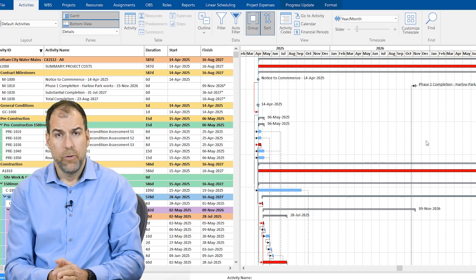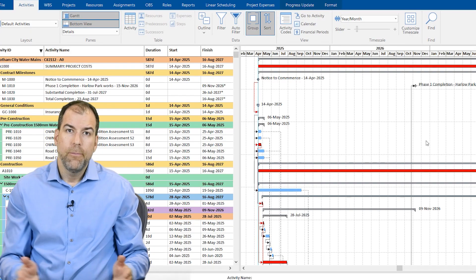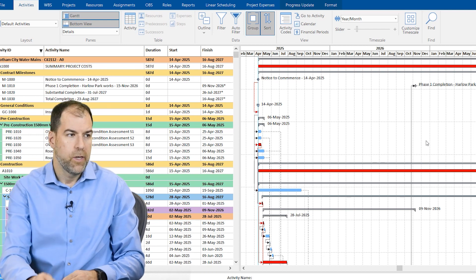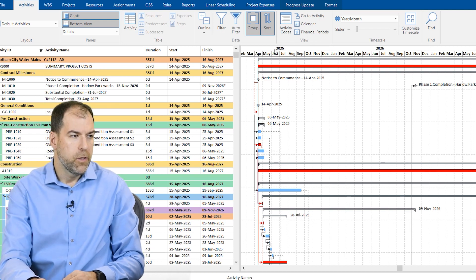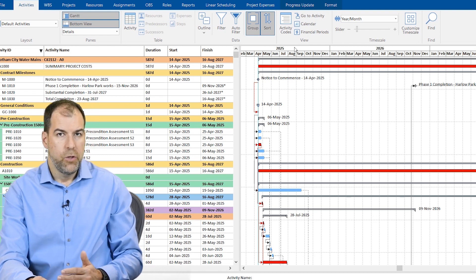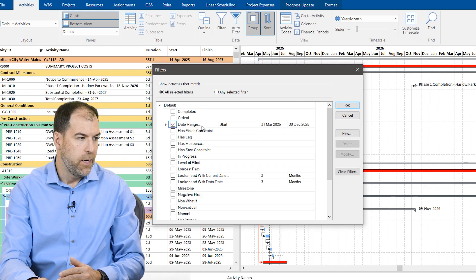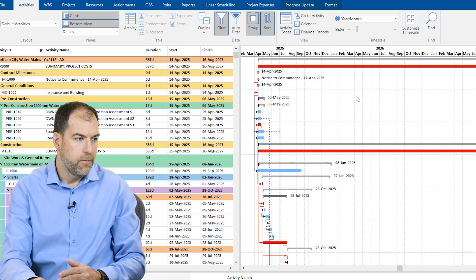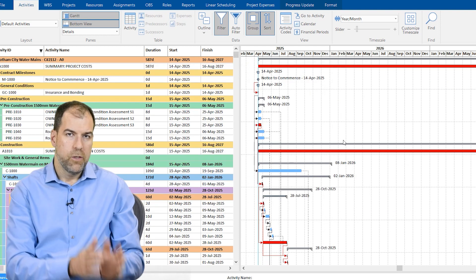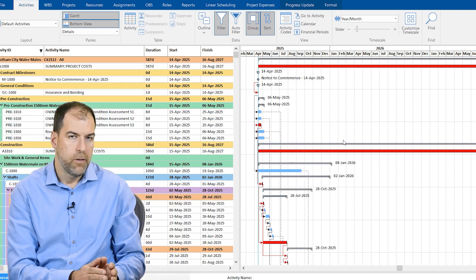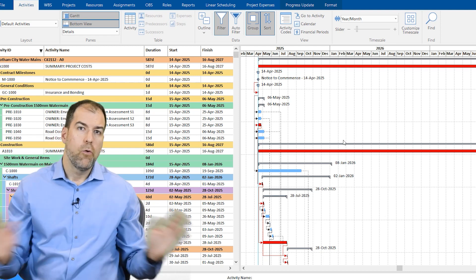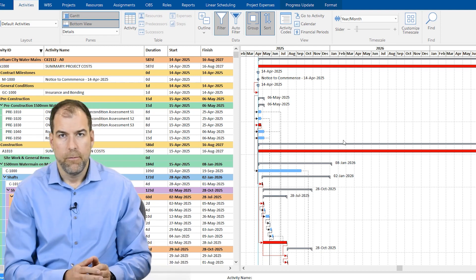Another best practice, if you have access to a tool, is to limit how much you're looking at. For example, maybe we just focus on the work happening in 2025. We can do that by applying a filter with a date range — say March 31st through December 2025 — so we're just focusing on work happening that year, ignoring everything else and getting a really focused view.